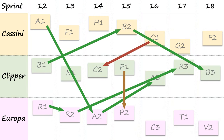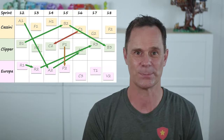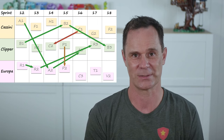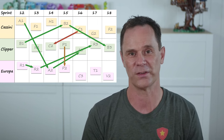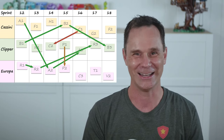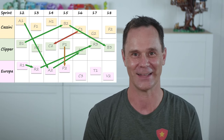Your teams might find it useful to maintain a cross-team refinement board like this, showing all of the features, their planned completion sprints, and dependencies. Update the board each sprint as things change during sprint planning and your sprint reviews, so that there's transparency across the state of everyone's work and your product owner can maintain her sanity. On my current project, we have a monthly flight planning meeting with everyone from all the teams invited to gather around our cross-team refinement board.